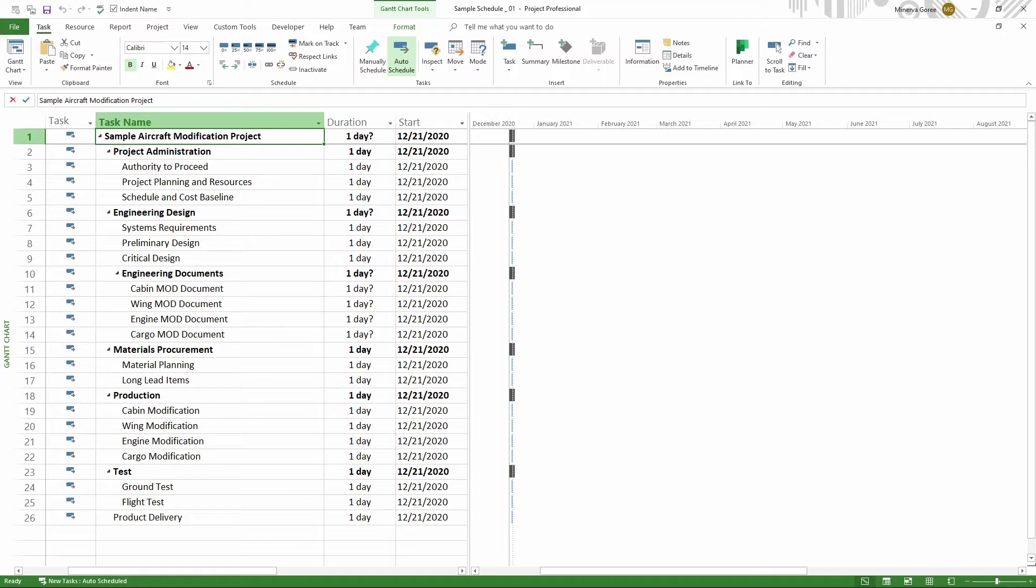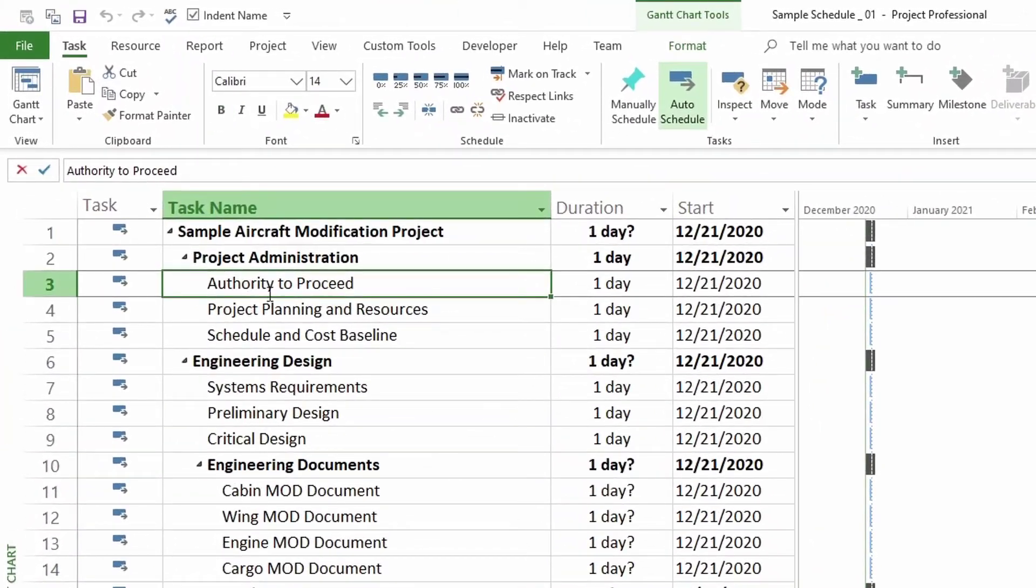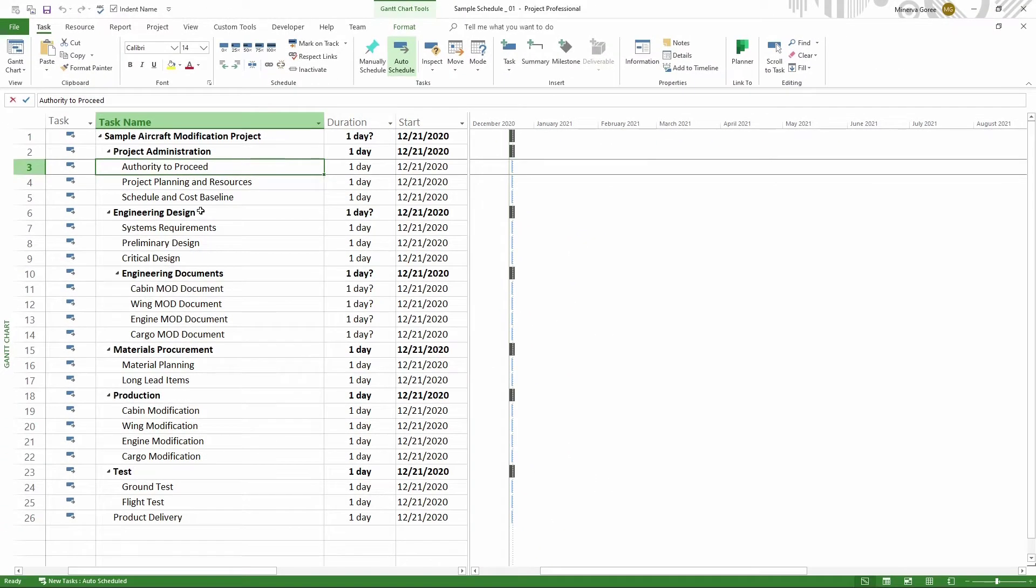The first task that I have here that I want to make sure it's marked as a milestone is my task on line 3. This is authority to proceed. It's similar to contract award, or if you like, it's the project start. Therefore, it's just a milestone. Right now I have it identified with one day duration which makes it a task.